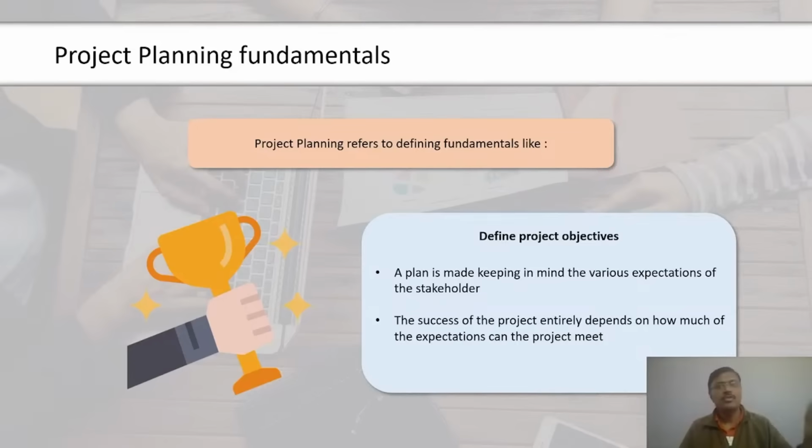So we do decomposition top down and do project breakdown first, and then we go bottom up, adding budget, resources, schedules, efforts, then resources required, then how long it takes, in what sequence sequencing can happen after having the work breakdown structure. Like we said, critical path or Gantt chart sequencing, those we can do only after the work breakdown structure.